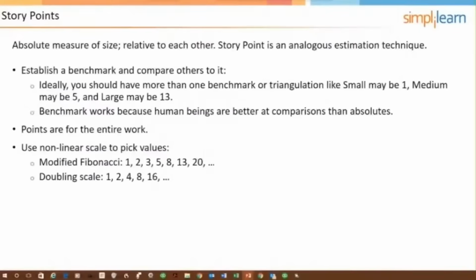The way the Fibonacci sequence works, by the way, is that the value is the sum of the 2 on the right. So 13 is 5 plus 8. 8 is 3 plus 5. 5 is 2 plus 3, and 3 is 1 plus 2. If we were doing the real Fibonacci series, this wouldn't be 20. It would be 13 plus 8, which would be 21.